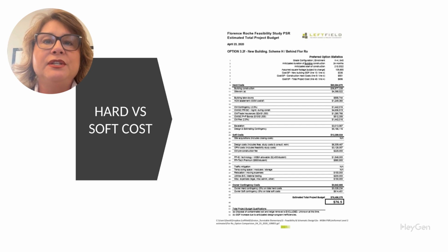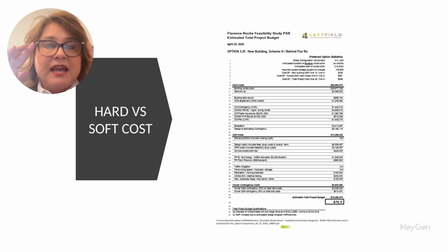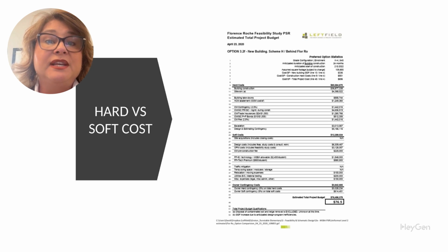The CM contingency of 2.5% and a separate CM fee of 2.5% are included. These add up to nearly $2.9 million combined. There's also over $4.6 million budgeted for construction management during the job, as well as costs for insurance and bonds. And importantly, nearly $8.2 million is reserved for escalation and design contingencies. This reflects both inflation and the fact that this is still an early phase estimate.